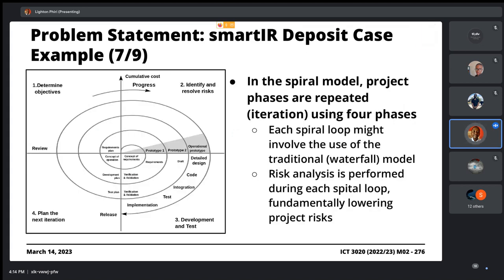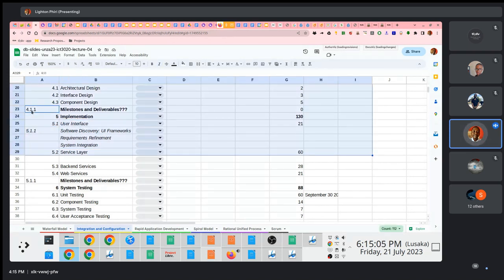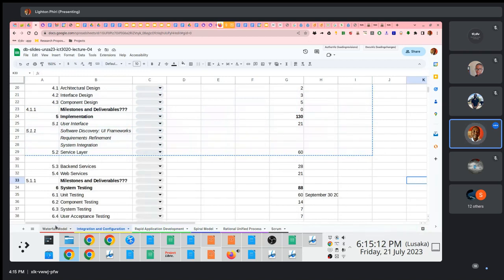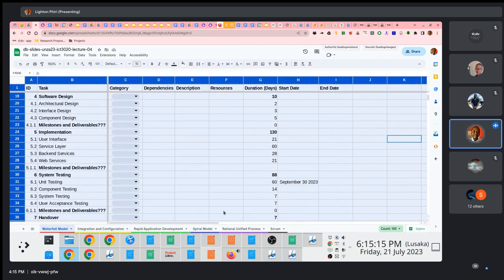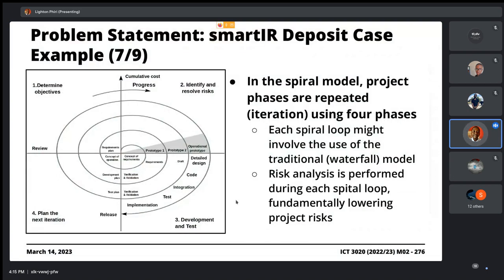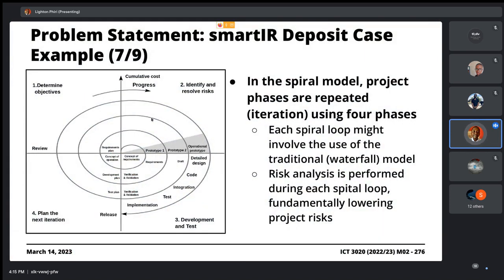The same applies to the spiral model, right? If you're saying you're going to leverage a spiral model, then what we expect you to do is, somewhere in the implementation, it may not be exactly the way it's appearing right here, but somewhere in the implementation, you would have to derive this work breakdown. A starting point would be determining how many prototypes you aim to work towards, right? As you're developing this software.